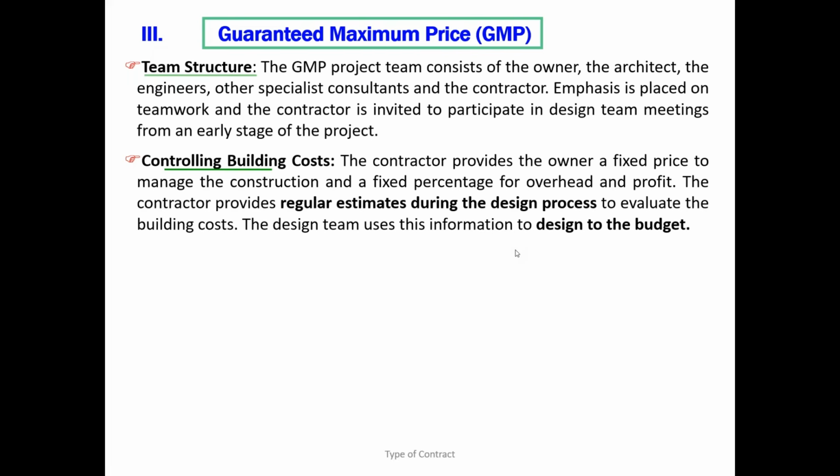The contractor finishes the work at 99 million. How much will you pay now? Now the contractor finishes the work at 102 million. Now how much will you pay? Okay, 100 million. See, he can claim up to 100 million. If it exceeds, he will get nothing.